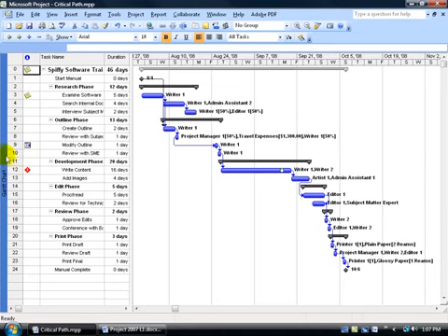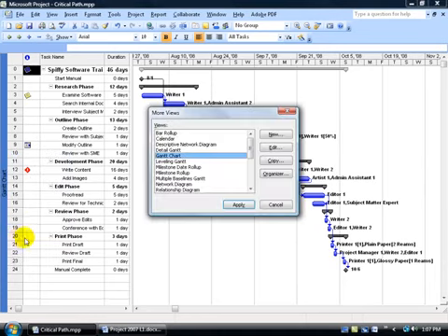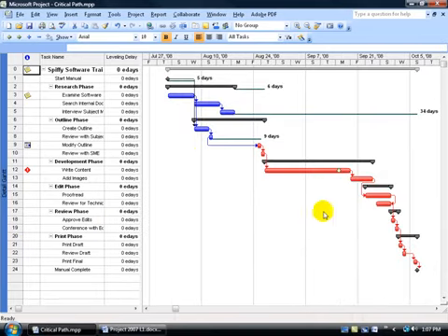For example, come over here and I'm going to right click on the collapse view bar and go down to more views, and there it is, the detail Gantt. Go ahead and double click on it, and there you see the critical path is formatted in red, and these dark green bars, that's the slack time, the amount of time that this task has to slide or slack off before it affects, in this case, this task, the project's due date. You've got about 34 days.